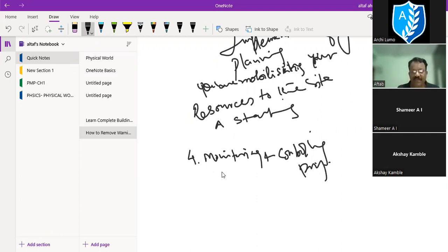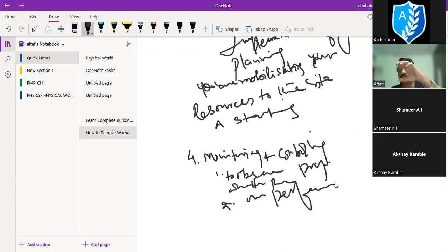Why are we doing this? We want, number 1, to observe whether our project progress is as per our baseline schedule, the initial plan, which is called the baseline plan. As per that, we are going on. And number 2, our performance in the project: how much percentage of excavation, how much percentage of PCC is done within this period.